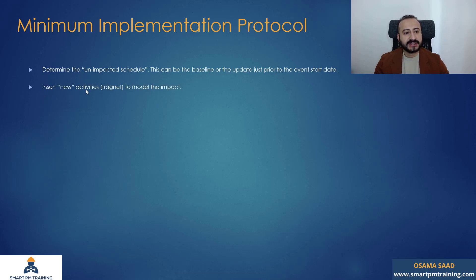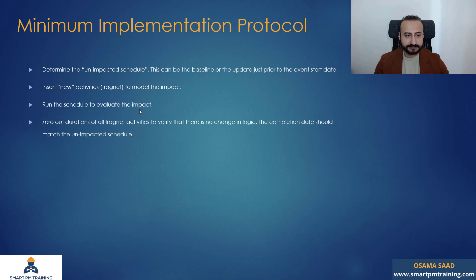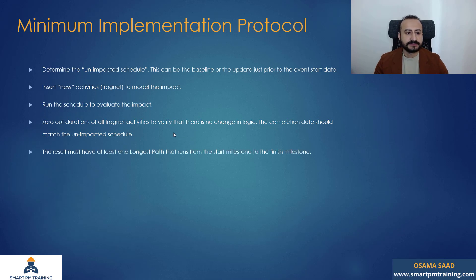Insert new activities or a fragmentary network — a fragment for short — to model the impact. Run the schedule to evaluate the impact. Then zero out the duration of all fragment activities to make sure that there was no other change in the schedule.